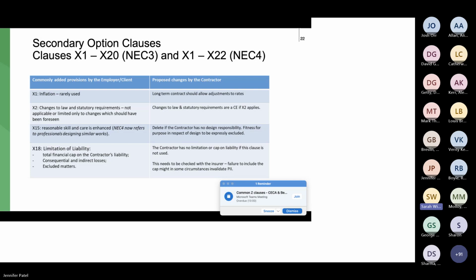So it might be that the contractor's liability is for 6 years only and capped at £10 million, but neither of those apply if it's covered by insurance, and they don't apply to delay damages, or to fraud. If there's a fraudulent claim, it doesn't apply. So there's a whole list of carve-outs from that cap. Some of them, like the fraudulent one, you can think, well, that's valid, but the list tends to be so long now that you look and think, well, is that a valuable cap in any event? What kind of claims can come that aren't carved out of that cap?